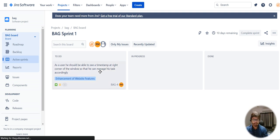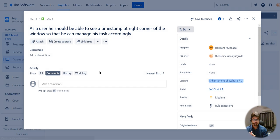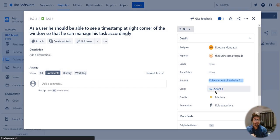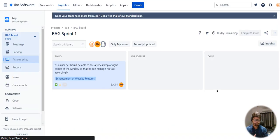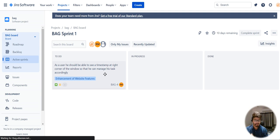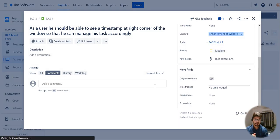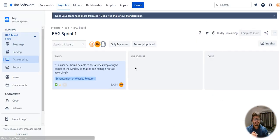When I click on the story you can see the complete details — the sprint is 'back sprint one.' When I click on sprint one, this is a two-week sprint, so this particular story should be finished within two weeks. All estimation is done before any story is created.